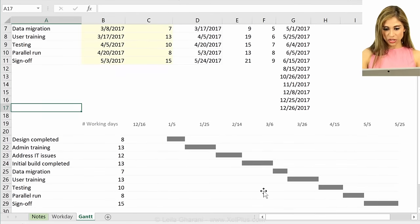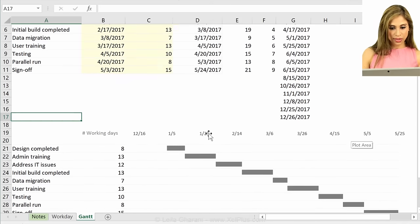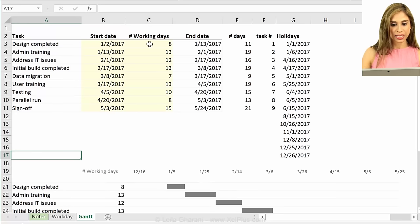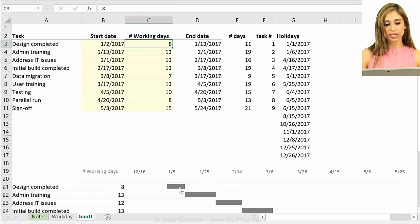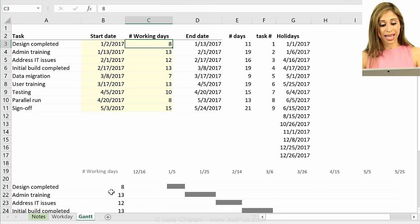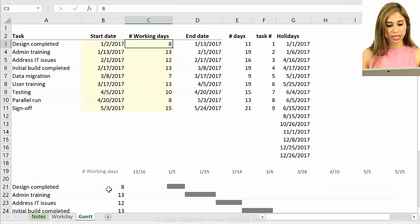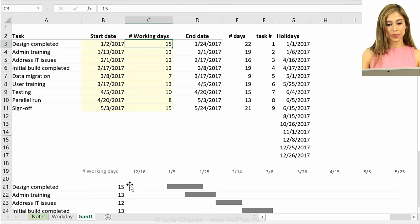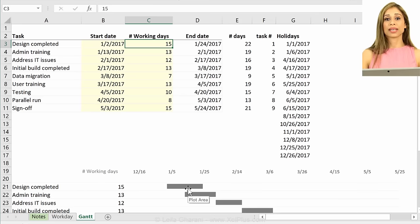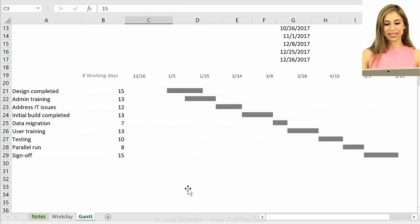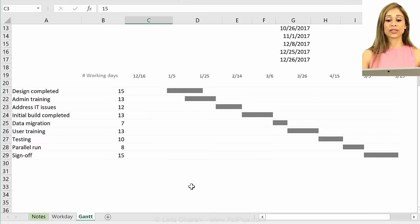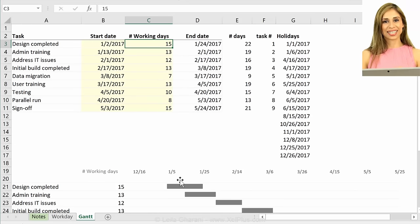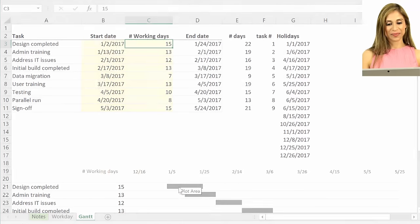So now let's just change something, make sure everything works fine. So let's take a task. Let's take the beginning task. We say for completion of design, we don't need eight working days. We need actually a lot more. We need 15 working days for that. So that expands, that shows here our full number of days gets calculated here and it's reflecting in our chart as well. So that's a quick way that you can visualize your project time plan in Excel and present it in your meeting.